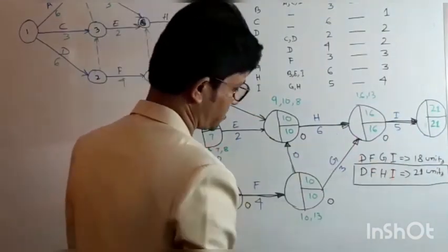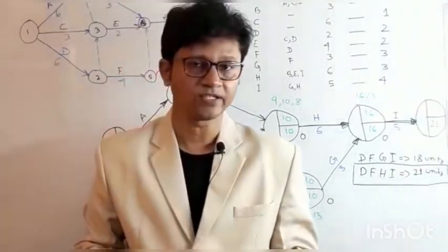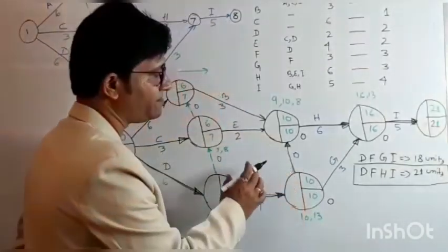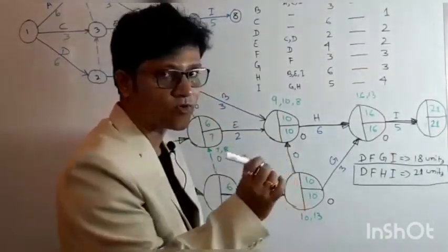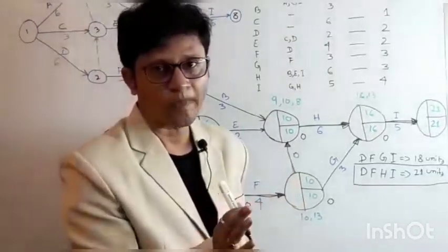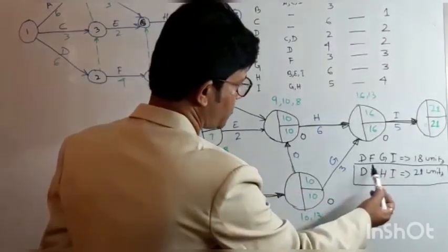The time taken by the critical path to complete this activity is 21 units. Now one thing is very clear from here, that is this dummy activity sometimes causes a problem in AOA activities. I have already told earlier that the dummy activity is a drawback of the AOA activity. You see, we already have a confusion here.